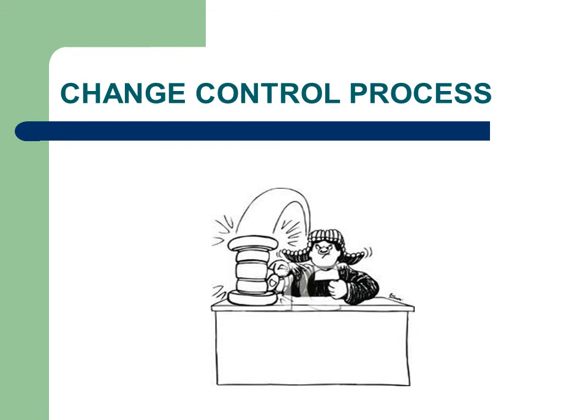Requests for change must be documented and sent to the project manager or authorized representative. It is important that only one person on the project is responsible for the change control process, and this must be the project manager.